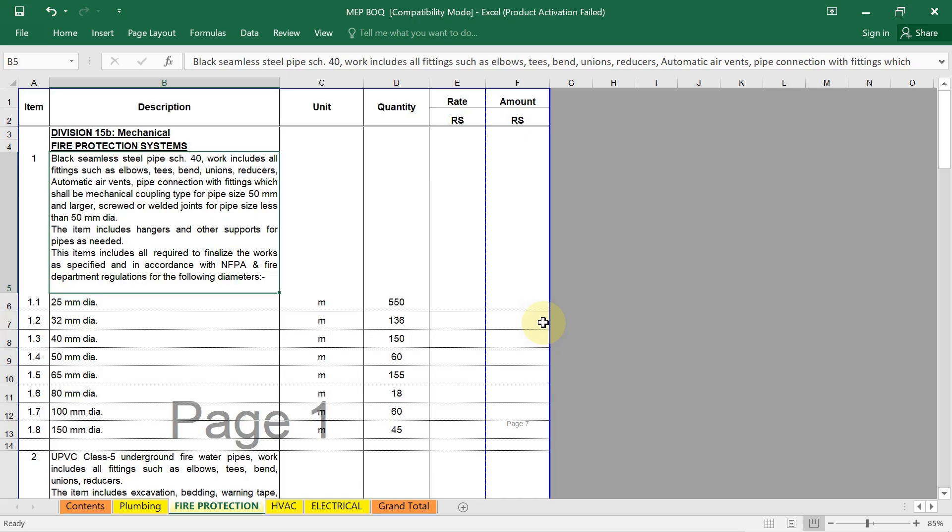Then quantify each item. Use appropriate units for the measurement of each item. Then finally, you have to perform the quantity takeoff, which I already discussed, from the drawing and specification to determine the required quantity for each item. Then unit rates and pricing, total cost is important here. Then you have to prepare the BOQ documents.